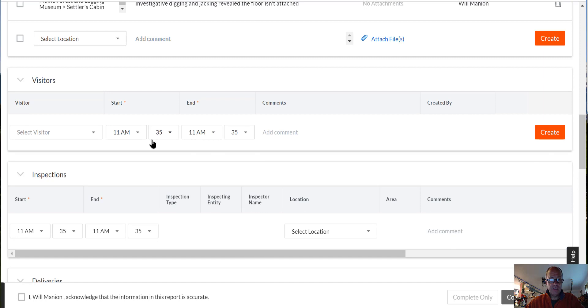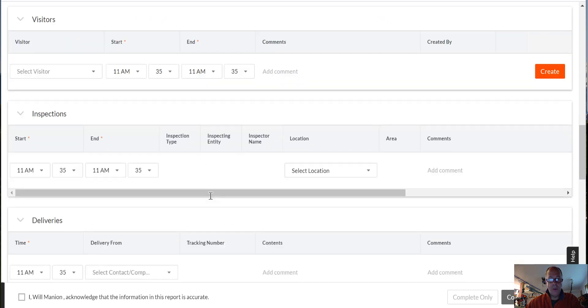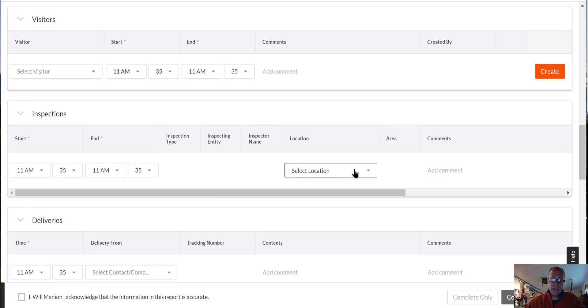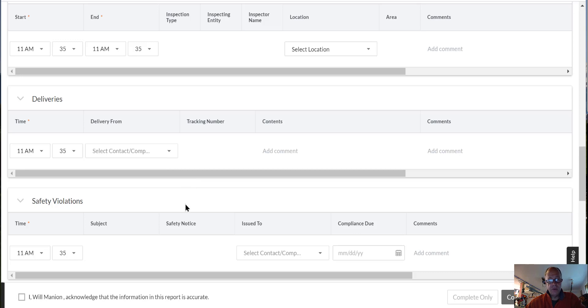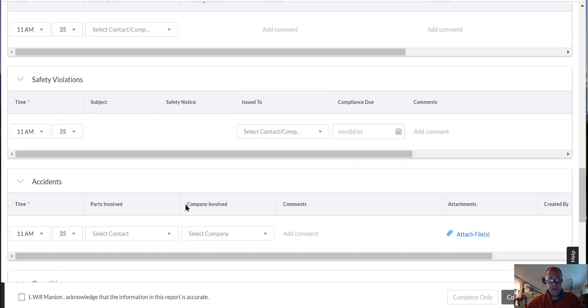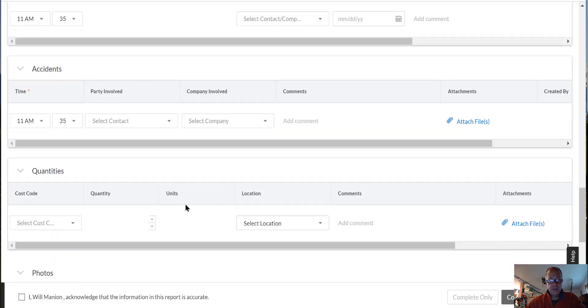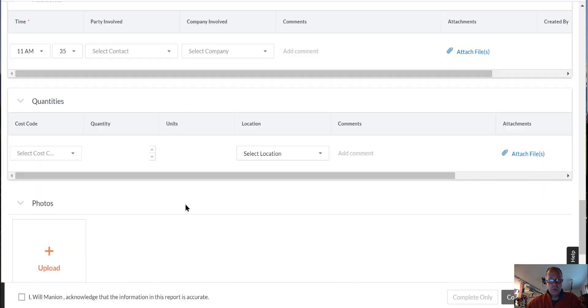Same kind of thing. Visitors, when they start to show up, showed up when they left. If we did any inspections, you don't have to put in all the inspections that are like the site safety and that kind of stuff. But if you have something else you're looking at. Deliveries, I know things were delivered at Leonard's Mills on Friday. Safety violations, if any accidents.